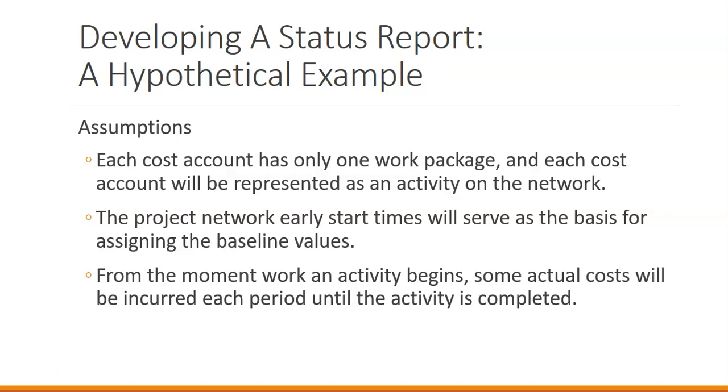completed. So this is that assumption that if we have an activity that takes 4 work periods, that 25% of the cost will be allotted equally over the work periods. That's that assumption that we're going to allocate costs over a certain percentage of time.